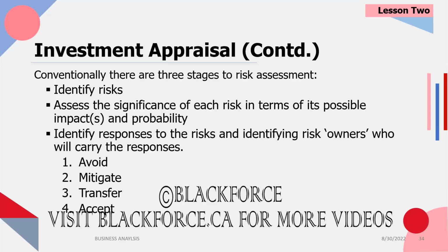Why do you get auto insurance? If your car crashes, somebody else should pay for it. You transfer the risk. There's nothing you can physically do within your power to avoid the risk. However, you've made plans. If the risk ever happens for real, somebody else will carry the cost of it. Okay?